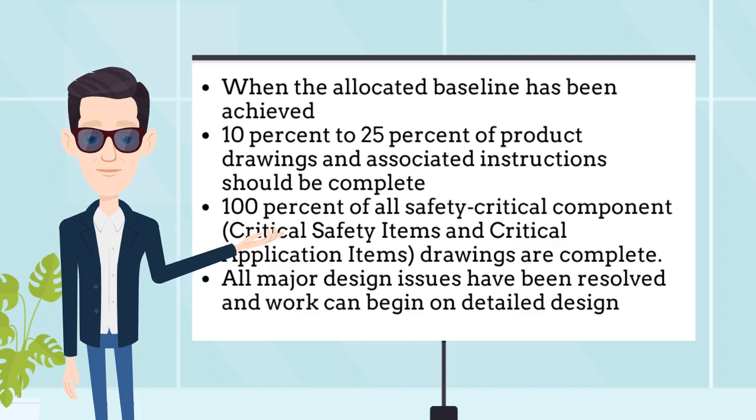The PDR should be conducted when all major design issues have been resolved and work can begin on detailed design. The PDR should address and resolve critical, system-wide issues before detailed design begins. For complex systems, a PDR may be conducted incrementally for each configuration item. These incremental reviews lead to an overall system-level PDR.